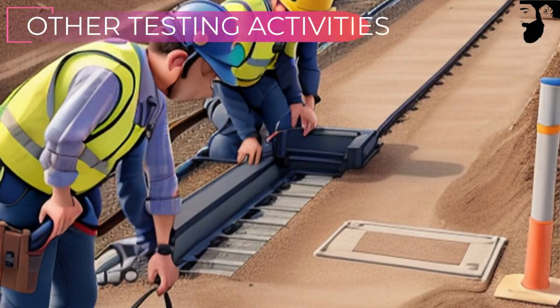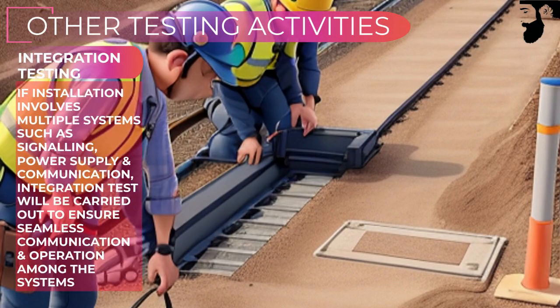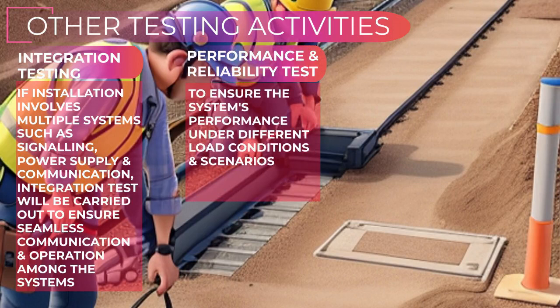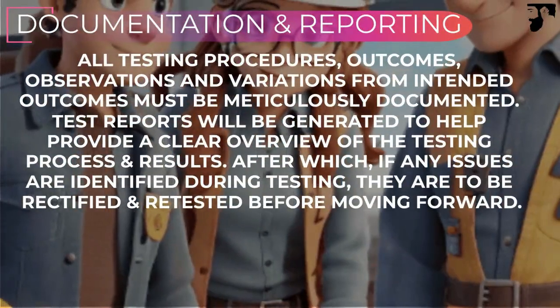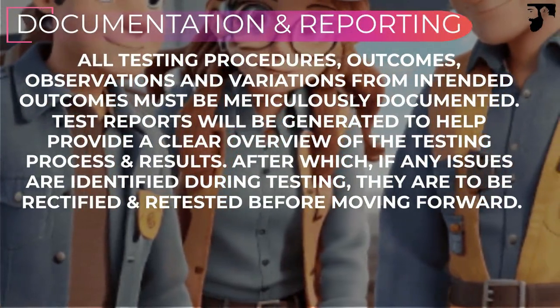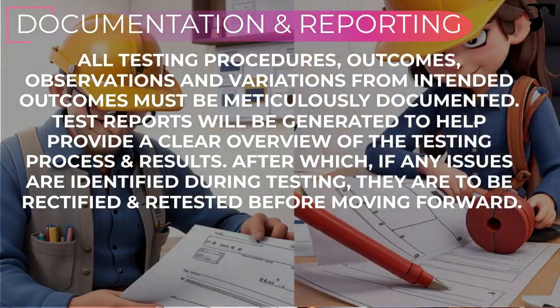Other tests involve integration testing. If the installation involves multiple systems such as signaling, power supply, and communication, integration tests will be carried out to ensure seamless communication and operation among these systems. Performance and reliability testing is another type of test to ensure the system's performance under different load conditions and scenarios. All testing procedures, observations, and variations from intended outcomes must be meticulously documented, and test reports will be generated to provide a clear overview of the testing process and results.